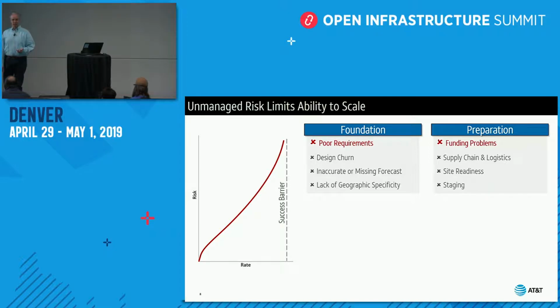And then where will those assets live once they're on site or at your hosting provider? Are those sites ready? Will you be able to grow them in the event the thing takes off and you're really, really successful beyond your expectations? Do you have a readiness plan to achieve that and host that? Or are you going to have equipment sitting in boxes collecting dust because Larry, who works the dock, had no idea that he needed to prepare 300,000 square feet of space for physical servers and cooling.